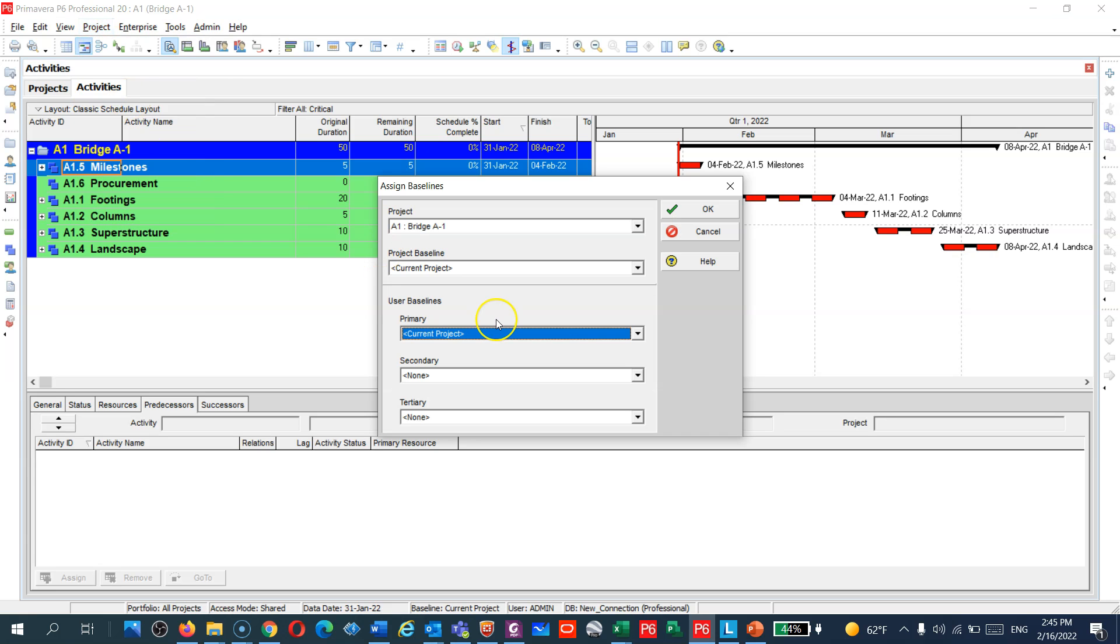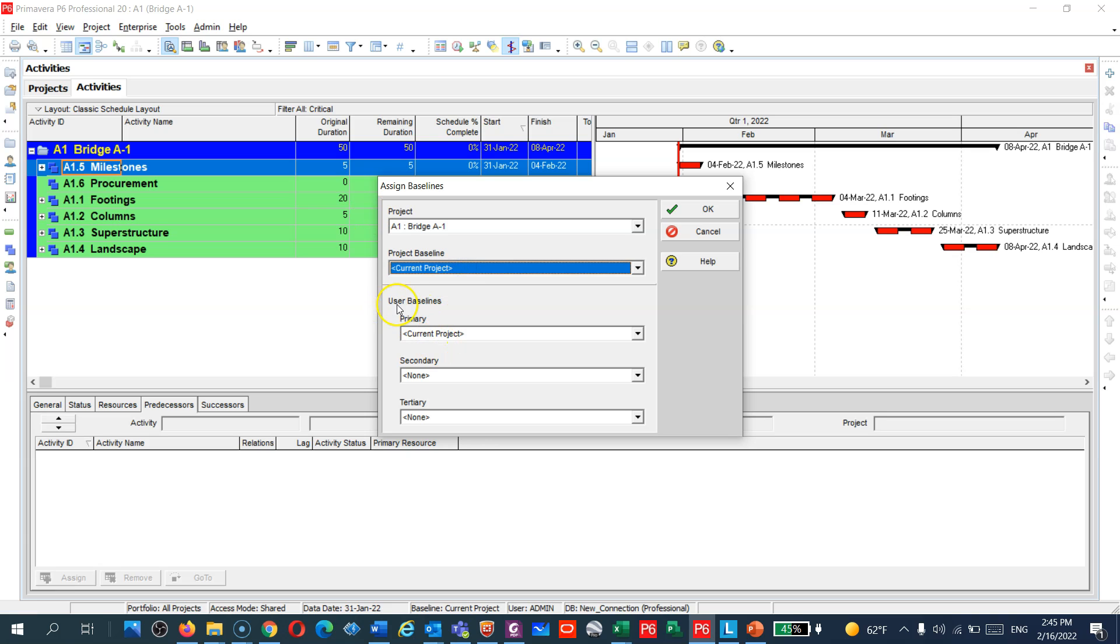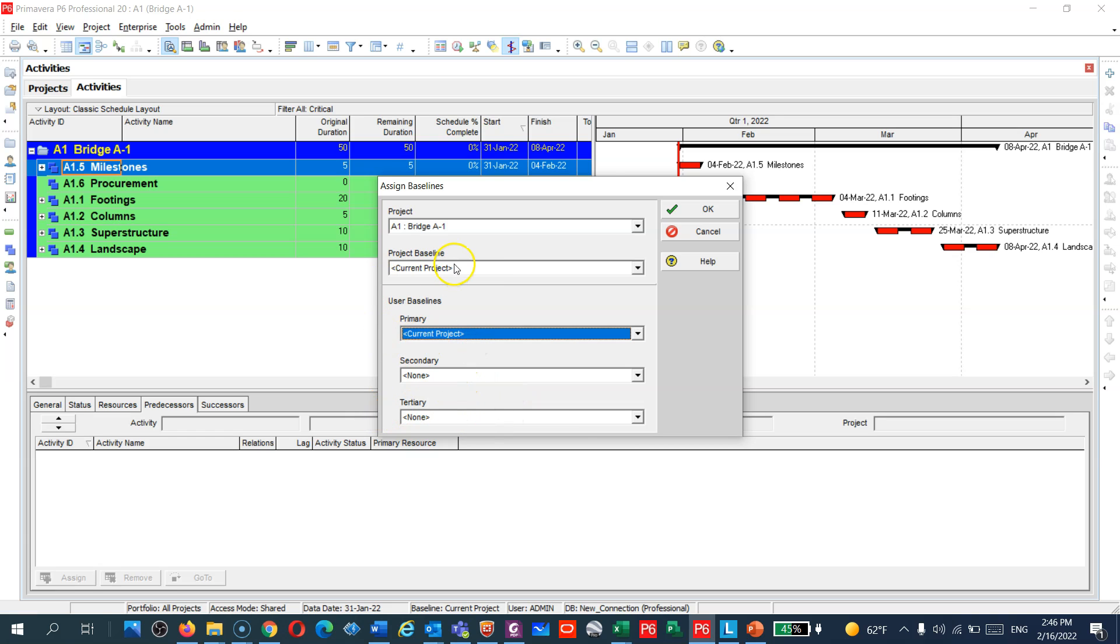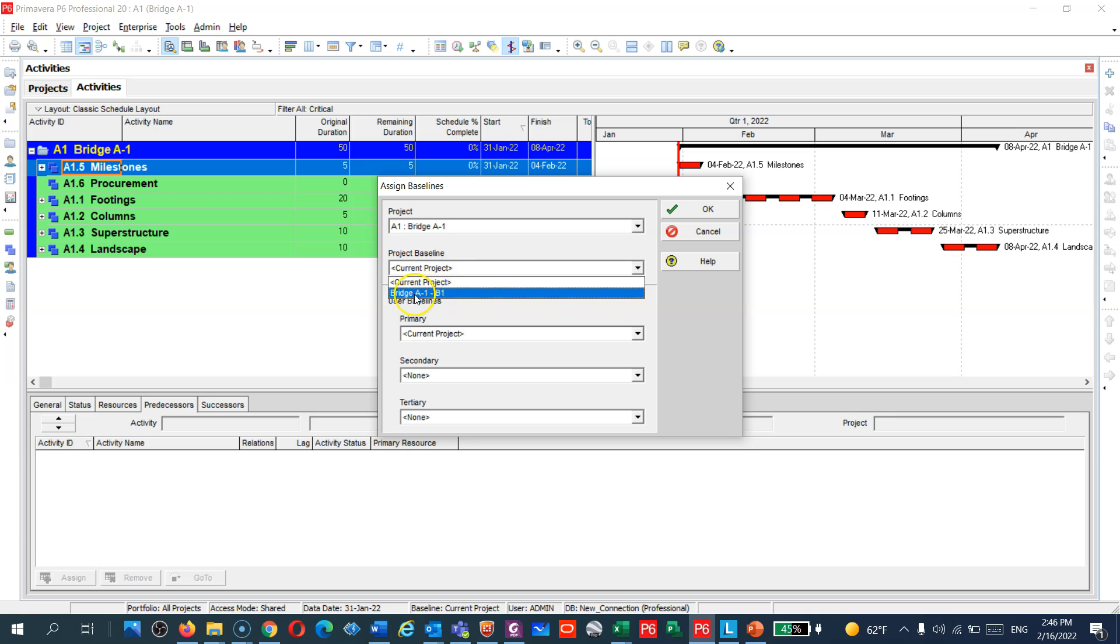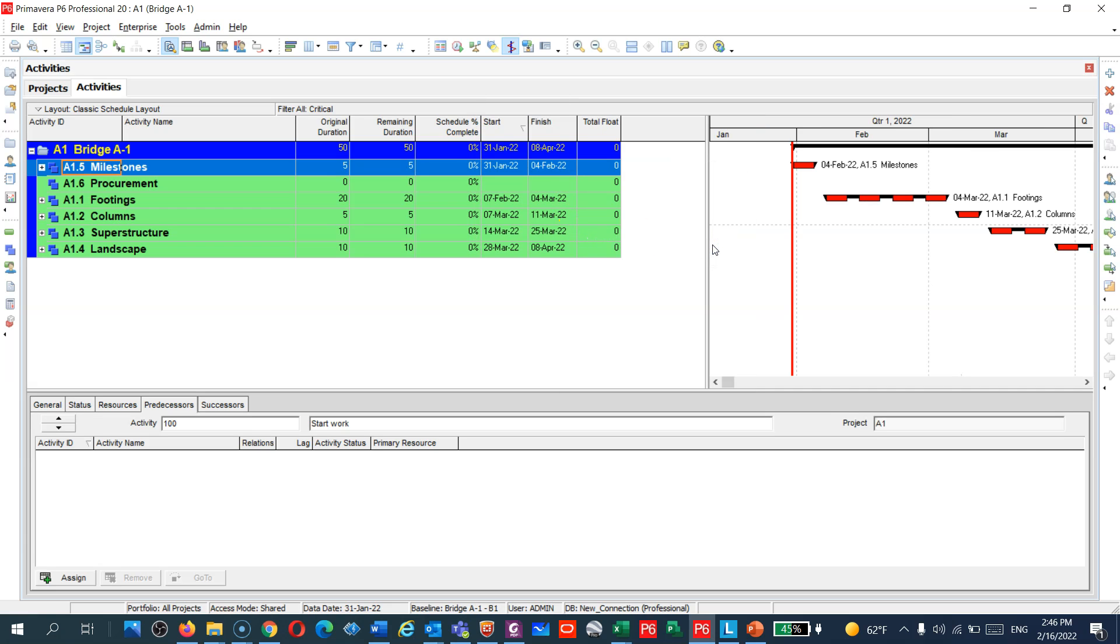You do this, that's fine, go back and then assign. Primavera allows you guys to assign many baselines. You have project baseline and you can use another, by the way: primary baseline, secondary baseline, tertiary baseline. You can create many, many baselines. But for us today I'm gonna add this baseline here and I will click okay.